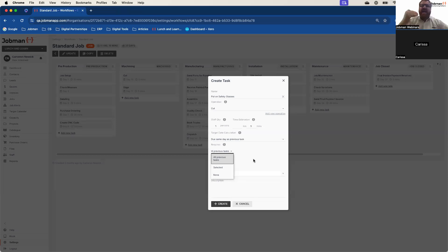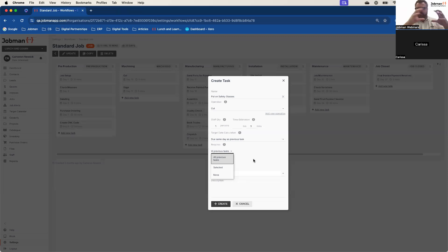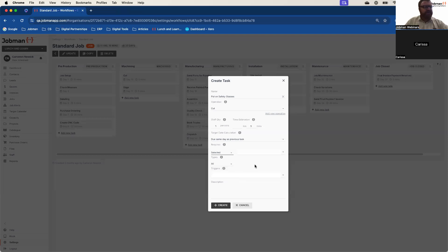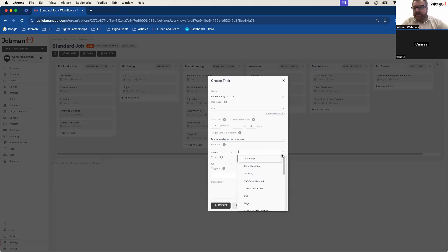However, in a lot of cases there are certain tasks in your workflow that can be done concurrently — and this is a very common question we get. You can come in and say: in order to start the cutting, I don't actually need the CNC code to be produced — I can set this operation so all I actually need is the purchase ordering to be done. So once that purchase ordering task is ticked off, the cutting team can immediately start, even though the 'create CNC code' task still needs to be complete as part of your job flow.